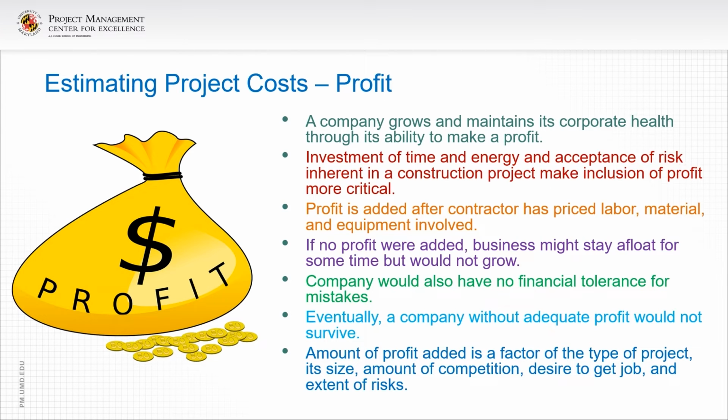If the company needs work and is faced with substantial competition, or has a strong desire to move into a new relationship with a client, the profit charged might be small. However, the company should not have too many small margin jobs on the books at the same time, so that it has sufficient coverage if something occurs on one job. Finally, a project with a high risk factor or one with little competition allows a company to add a higher profit.